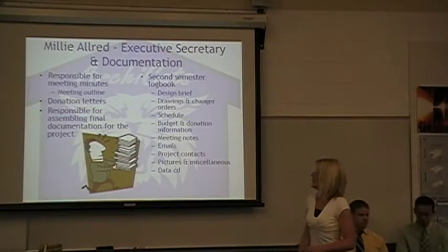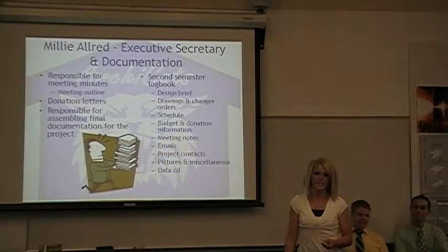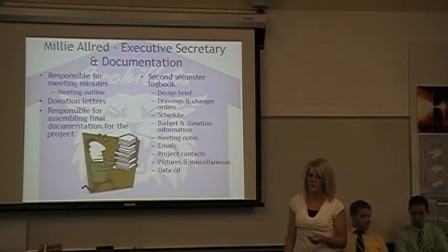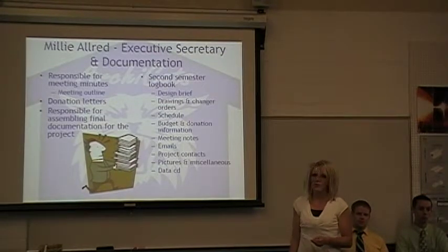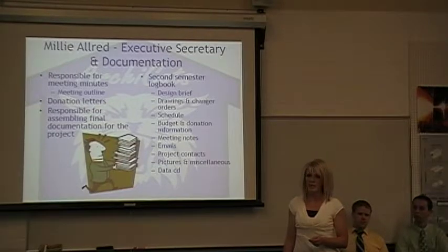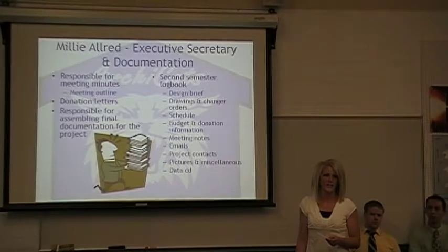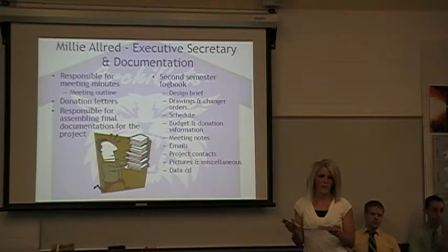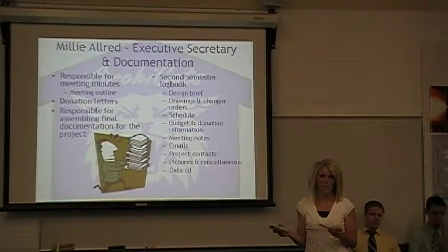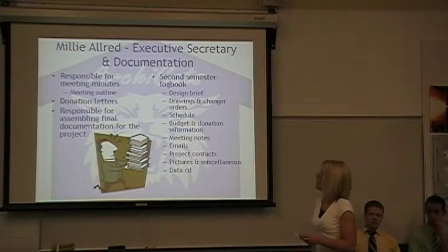Okay, my name is Millie Allred. I was the executive secretary, and I was also in charge of documentation. I was responsible for the meeting notes. Each week I would create an outline, and then we would follow the outline and write down what was accomplished the past week, what needed to be accomplished the next week, and the supplies that we needed.